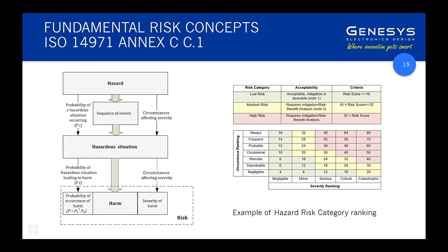In general, and also to meet European requirements, you need to mitigate and put risk controls in until the risk is as low as possible. So not just when it gets into the low level, but you have to keep going. So that's kind of another factor there. But yeah, it can get a little bit messy, but it's a good process. I think it's a good discussion.